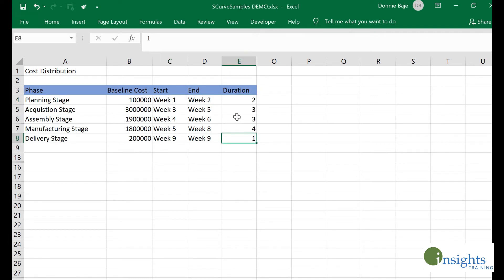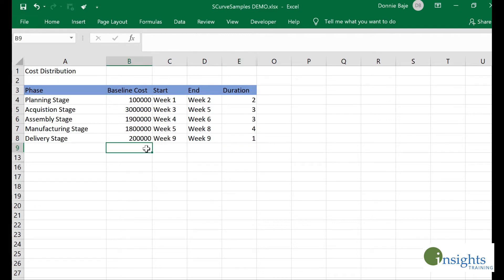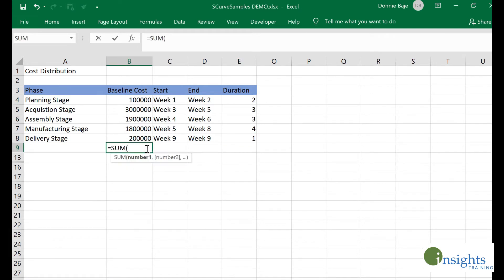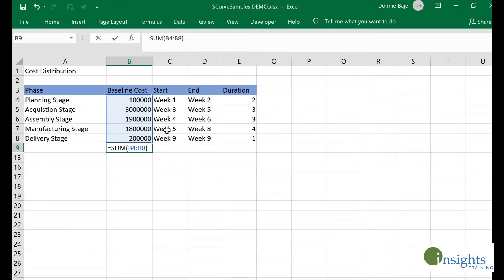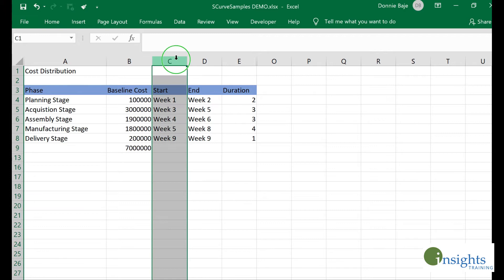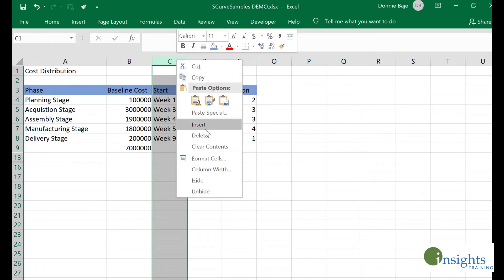The first step in our S-curve is to get the total cost, and that is by adding all those costs per stage using a simple SUM function. This tells me the total cost for the project is seven million.